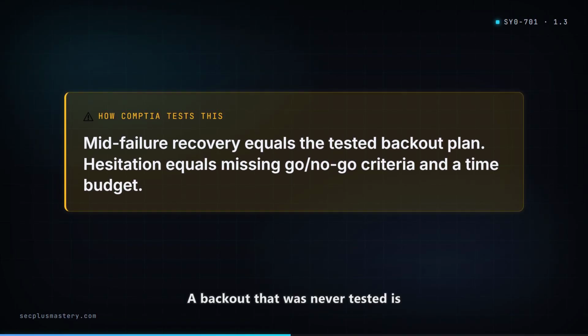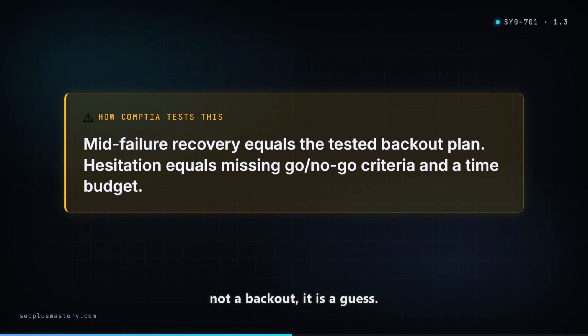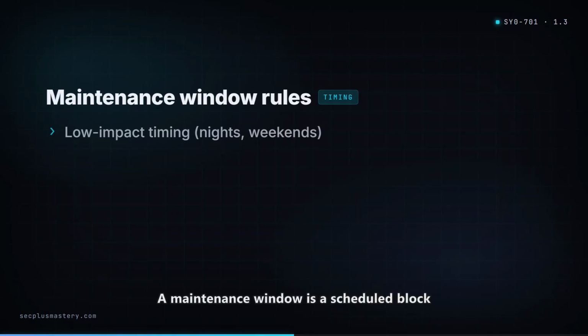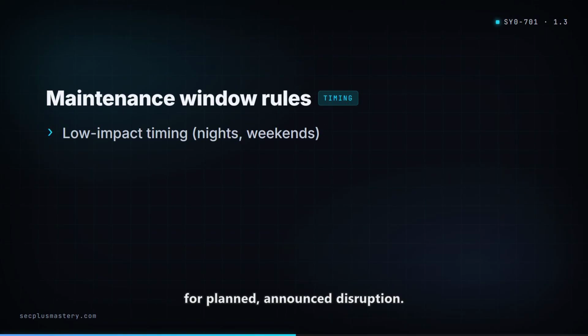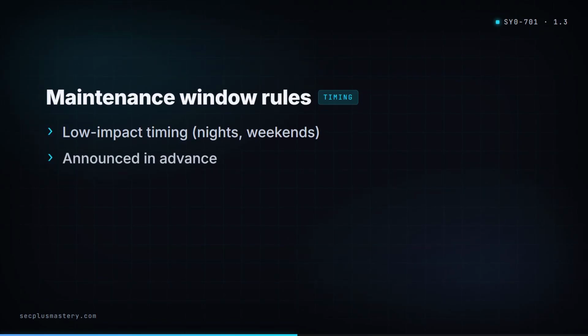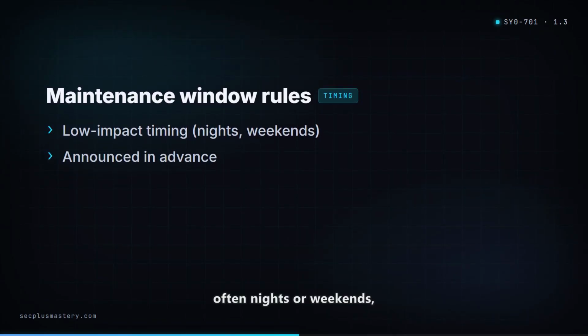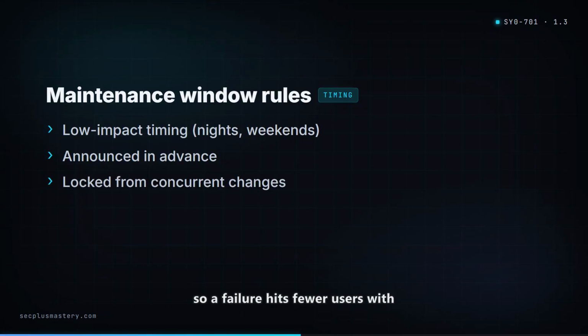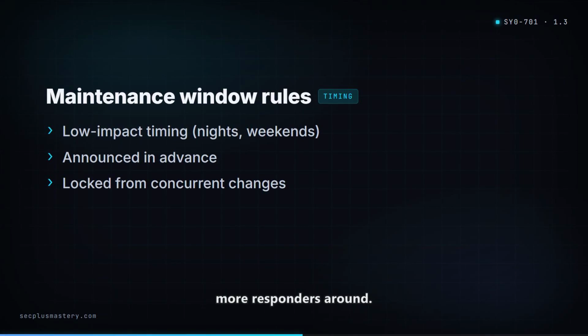A backout that was never tested is not a backout, it is a guess. A maintenance window is a scheduled block for planned, announced disruption. Pick low-impact timing, often nights or weekends, so a failure hits fewer users with more responders around.